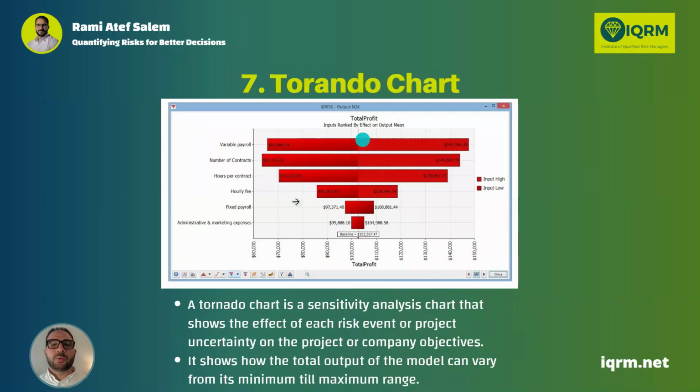And then we have something called a tornado chart. A tornado chart shows you what the key factors are that are affecting your model and the output of the Monte Carlo simulation. So it gives you good guidance on where we should be focusing next.